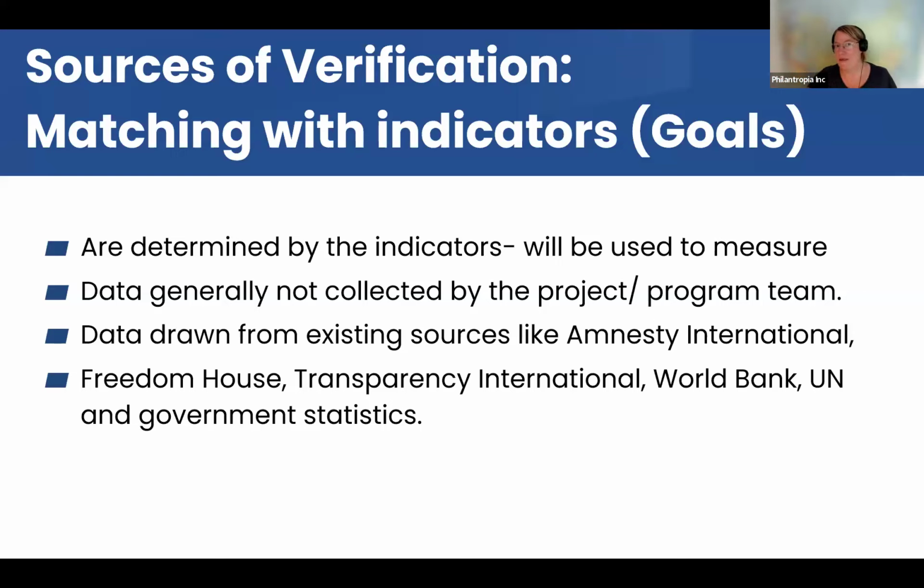Like a census is only done every 10 years. So if your project runs 3 years, then it won't help you on this. So you also have to think about the source of verification for your starting value, but also for your end value, because you will need another source of verification for where you're at the end of your project.